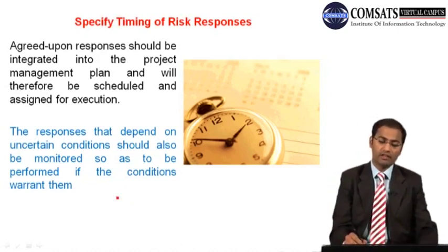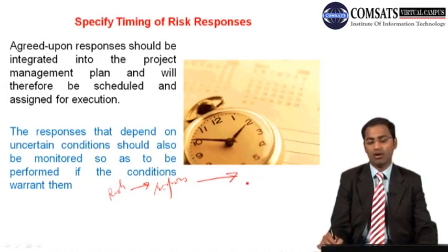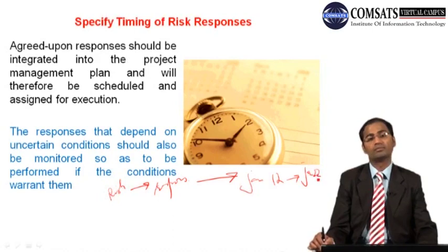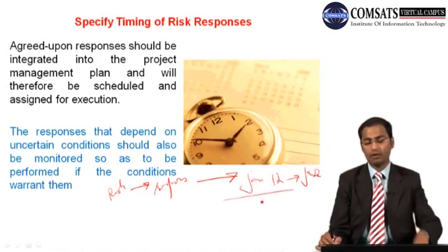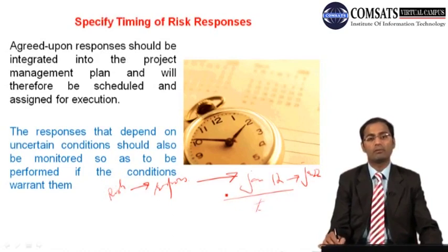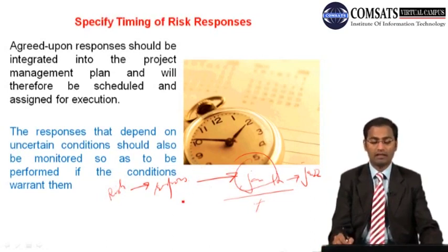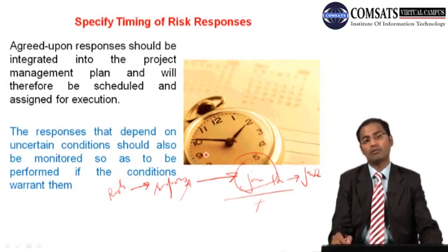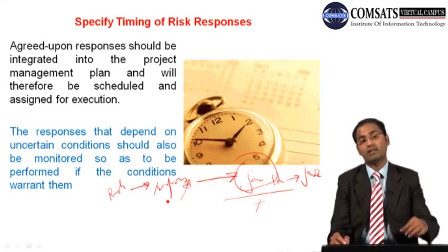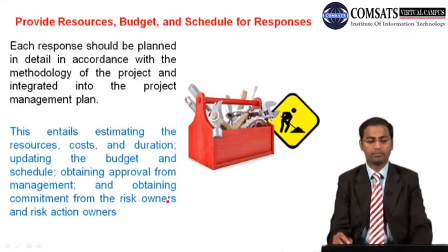If that is one risk and that is some response, that response will start on January 12 and run up to January 22, and there would be resources, cost, and time duration available for that. So you should be very much ready for January 12, where if you are a risk owner, you will keep an eye and perform the necessary work. So this is about the specific timing of risk response.